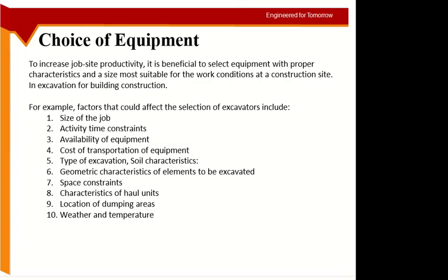Availability of the equipment. Okay. And this can be a problem for rental as well as ownership. For ownership, for sure. You will look at what size of equipment and excavator you have. But even for rental, let's say I am taking equipment from a particular company, and that company doesn't have a very small excavator. So I will try to avoid taking a chance with a new company for renting the equipment. People usually avoid this because this is risky.